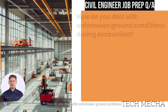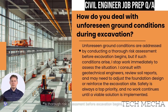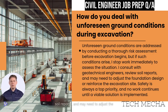How do you deal with unforeseen ground conditions during excavation? Unforeseen ground conditions are addressed by conducting a thorough risk assessment before excavation begins, but if such conditions arise, I stop work immediately to assess the situation. I consult with geotechnical engineers, review soil reports, and may need to adjust the foundation design or reinforce the excavation site. Safety is always a top priority.